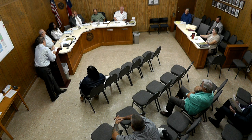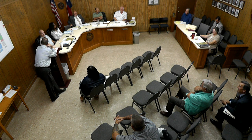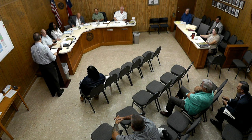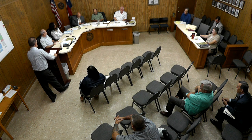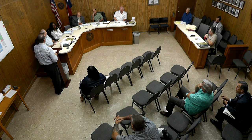Okay. Can we get both? Can you get both? Yeah. To my knowledge, we've not seen anything come in under 10. You've got this at 8. Yeah, this plan here is under. This one's 8.7 at $400 a square foot. It's cheaper than that at 350. Yeah, 400 is conservative.